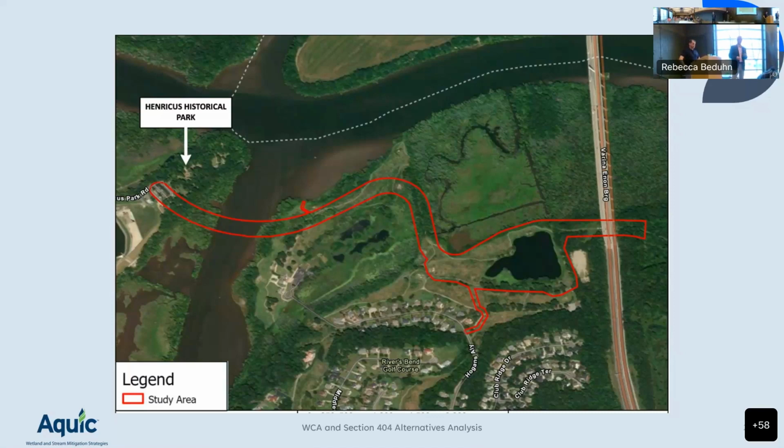Those are some big ones, and cultural resources are big. Cultural resources is sometimes the thing that ties everything up and makes the permit take a long time, with archaeological surveys, tribal consultation, all kinds of stuff. But it isn't everywhere. It isn't limitless. It does have to be tied to our federal action, which is a permit.